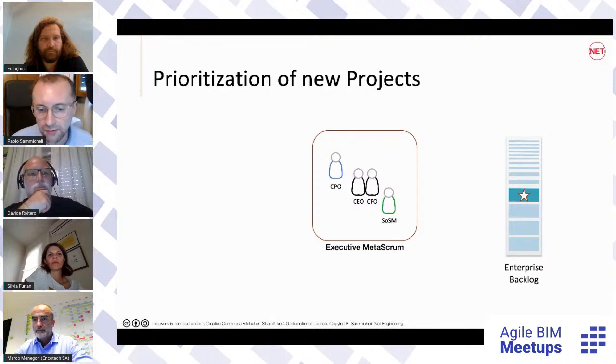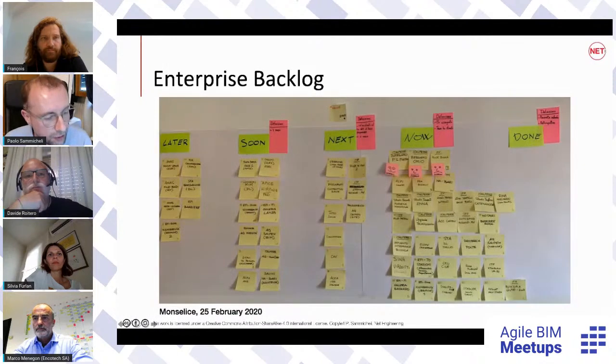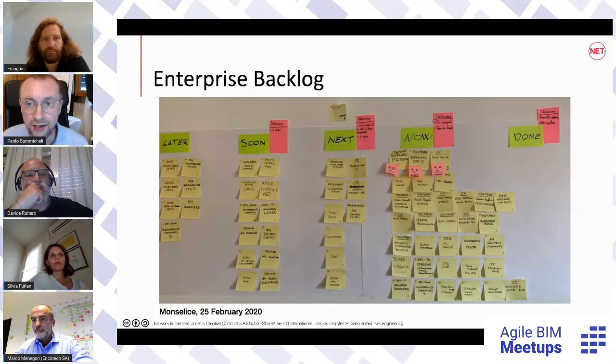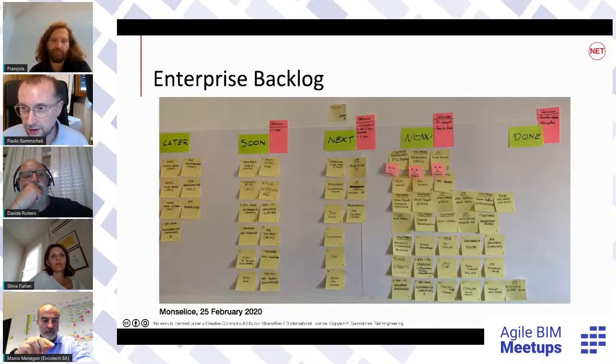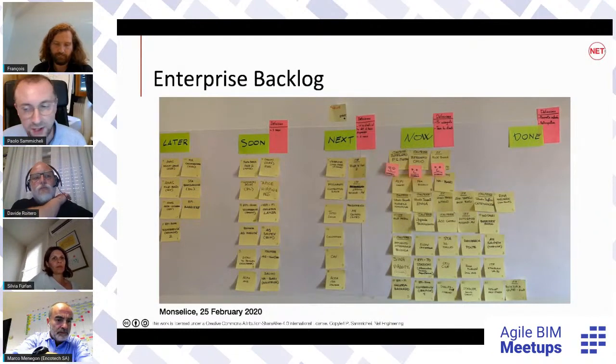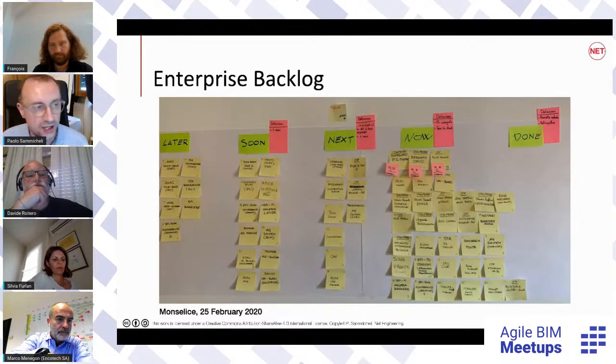But of course, Scrum, as I described it before, is quite idealistic, right? Because we say, well, every 2 weeks we plan the work, we do the work, and then we review. But we also have some unplannable work. So how can we do that? In Scrum, we have a pattern called the interruption pattern. How it works: instead of planning for all the team capacity, we leave some empty space as a buffer. And we estimate that buffer as well, like it was an item to deliver.